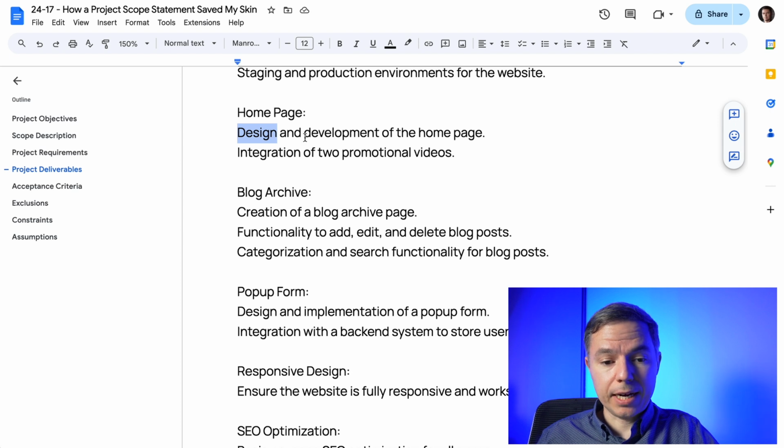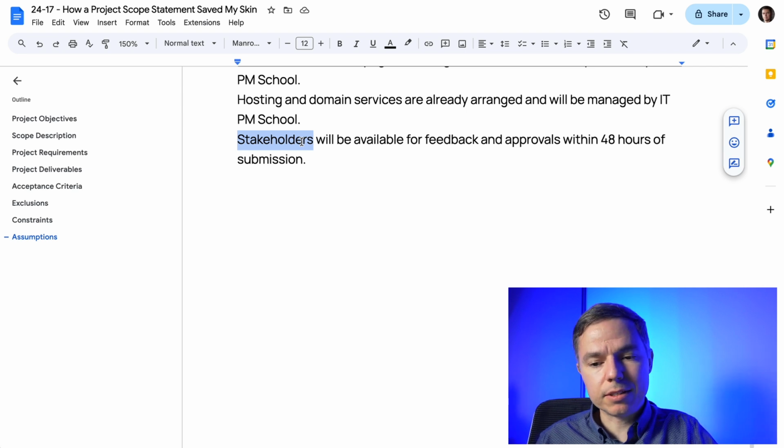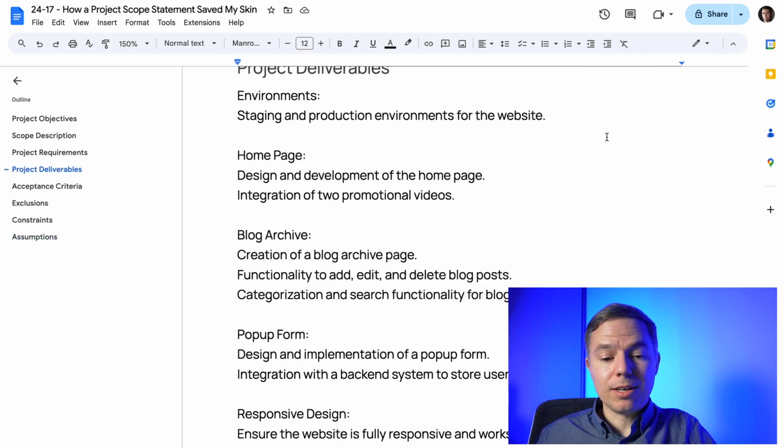So based on this assumption, every iteration or every interaction with the customers will happen within 48 hours, and our plan will be based on that. So if we deliver you something from this list, you will get back to us in 2 days or less. Ideally, you do it instantly. All right, there you have it.